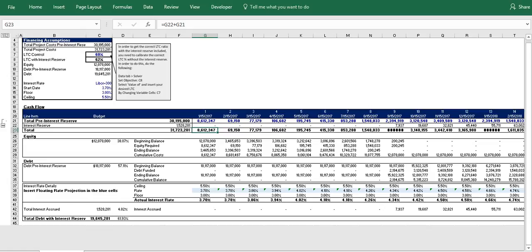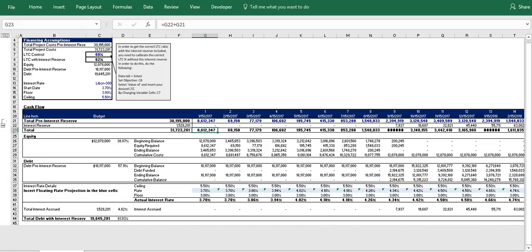So setting the model up like this is key to being able to resolve this iterative problem with the interest reserve. You need a cost schedule without the interest reserve first to initially create the interest reserve in the first place, and then you need a construction schedule with the interest reserve included that will allow you to calibrate the loan to cost accurately. And this will make more sense as we move forward through the model.